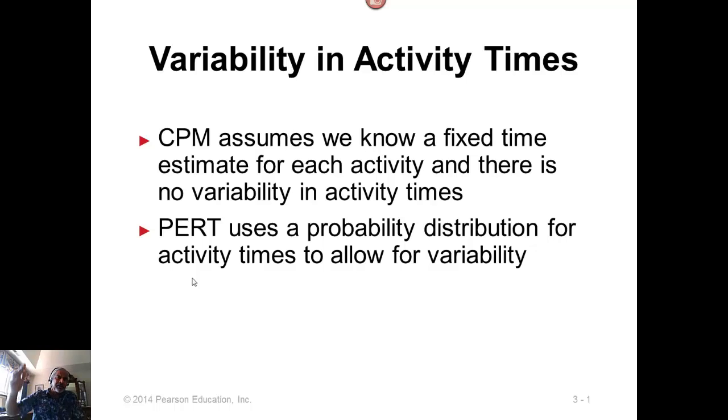But on the other side, if the activity gets delayed, it can go from 5 to 6 weeks or 8 weeks or 10 weeks or 15 weeks or 20 weeks. There is no real hard ceiling for how much delay there could be in the activity time. So the probability is not symmetric.